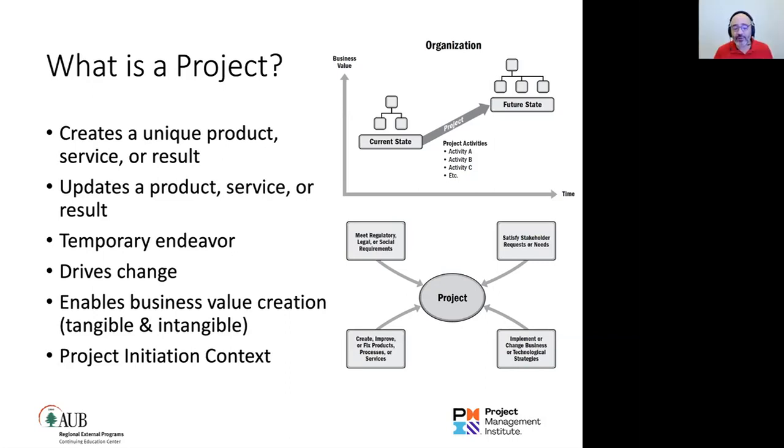Or projects are initiated to create, improve or fix a product or process or service. Like what we did with the mobile payment application version 2, after we gathered focus groups in a hotel over 3 days and took their experience, and improved it in version 2 of the mobile payment application. So in the context of initiation, it comes from a strategic direction, or from a regulatory or legal requirement, or the client wants to improve something. These are the definitions of a project. If none of them is satisfied, it's not a project.